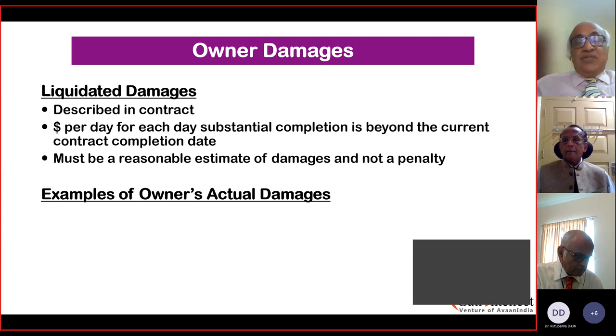So these are things which people generally use, these urgent and air freight options. Similarly, if I were a contractor in a project, I would pay overtime to people. I would make sure that people work and incur that extra cost over and above what I am eligible for, but I can avoid the claim. So these are calculations which a project manager would do at the contractor end so that they don't have to pay the owner damages.